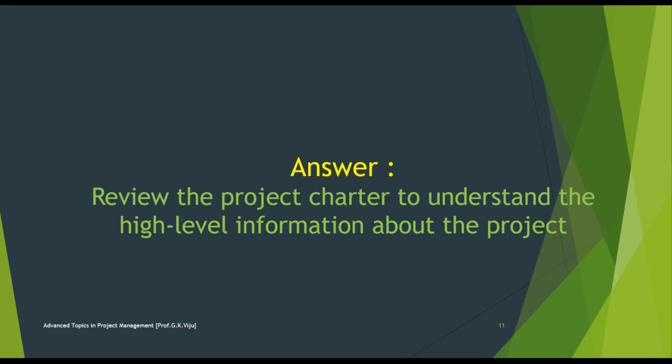share the project scope statement with the project team for a common understanding of project deliverables. The project scope statement is an output of the define scope process, which is one of the processes in the planning process group. As such, it is not yet available at the start of project planning. Therefore, this answer choice can also be eliminated.